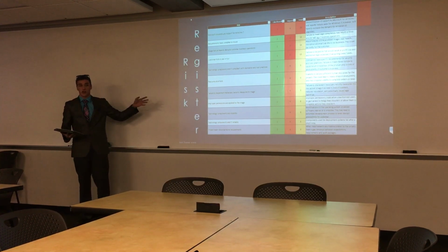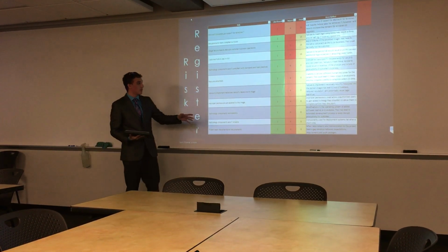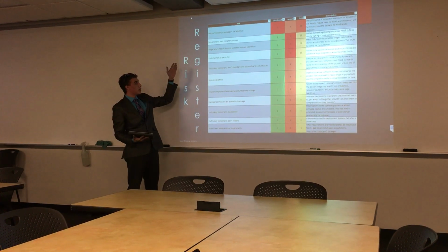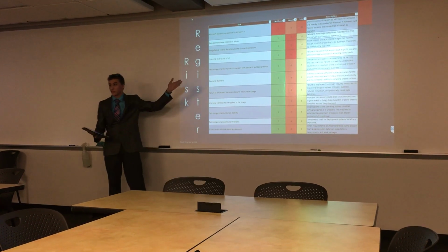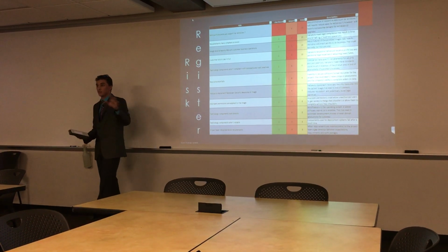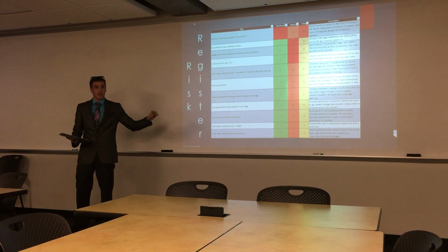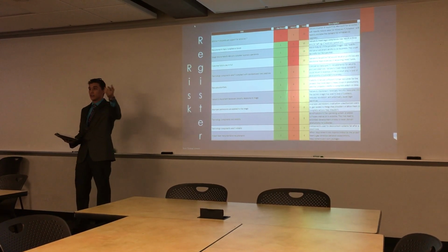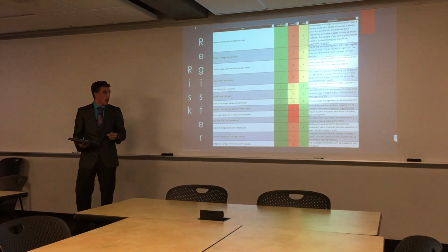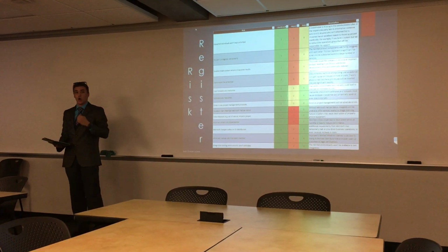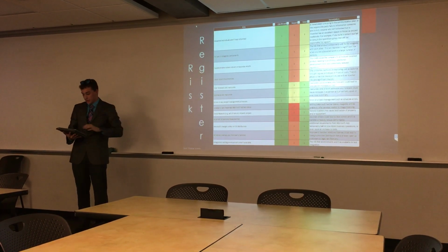Here we have a risk register, also known as a risk matrix. Due to time constraints, I'm not going to go into every single one. However, I would like to detail a good, positive risk, which would be Microsoft discontinuing support for Windows 7. This might seem like it would be bad. However, due to this, we have additional opportunities to convince companies to upgrade to Windows 10 or a succeeding operating system, therefore either bringing new business in or renewing old contracts.